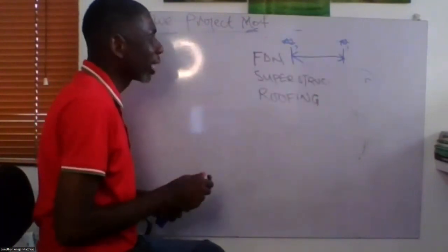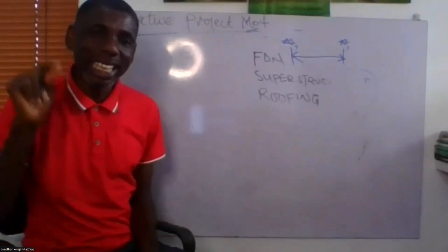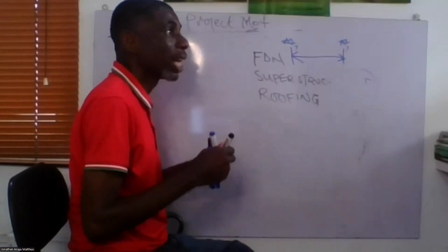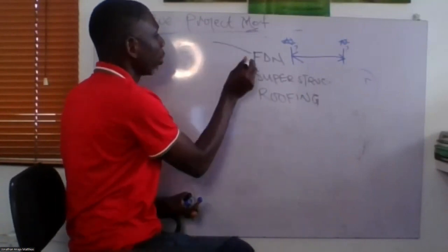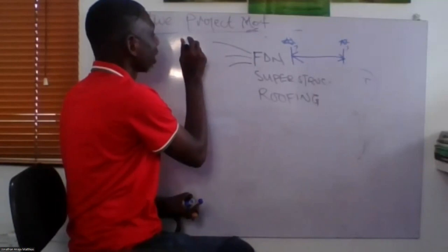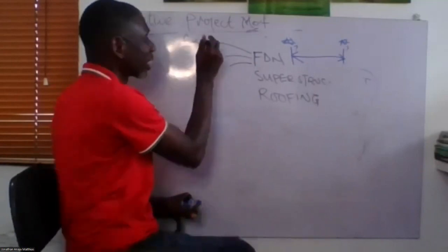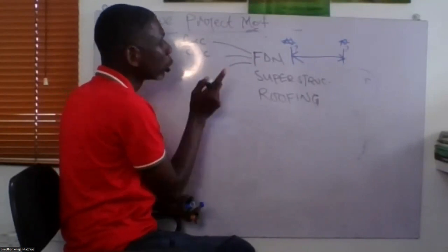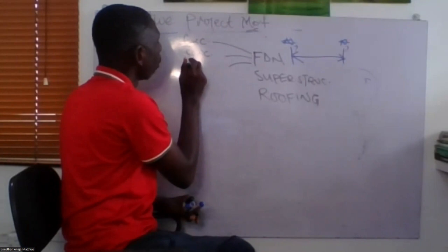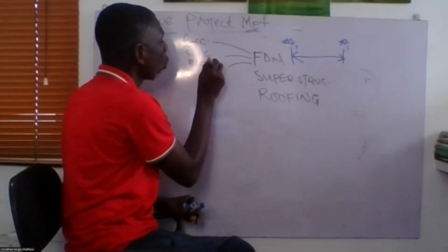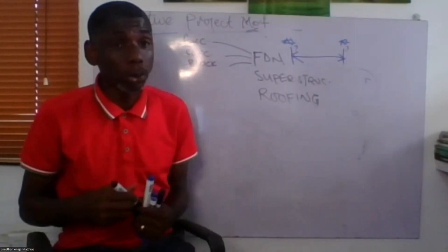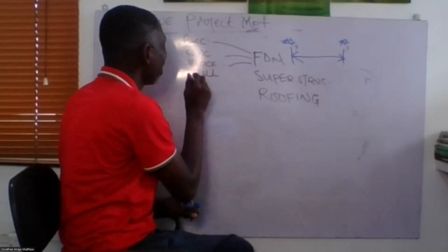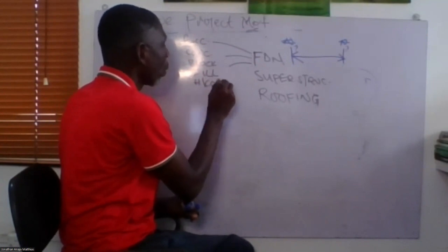But for him to get the start date and end date of the foundation, he may not be able to just do that without first breaking down into various activities. Like I did yesterday, I started by saying he needs to excavate, then he will need to do concrete footing, block work, weak concrete and fill the block holes with concrete, filling, and hardcore.